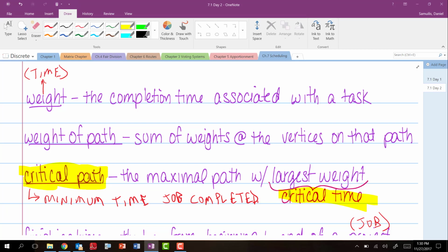The idea behind that is something we talked about last Tuesday. When we say a task is X minutes long, it cannot be completed any shorter than that, no matter how many people work on it. It's a perfect example of that, and that's the idea of it.